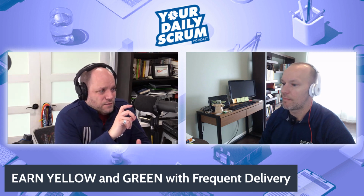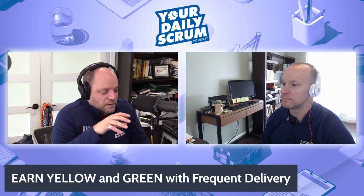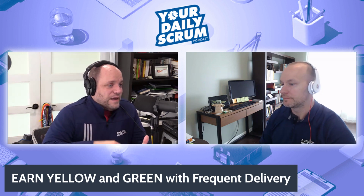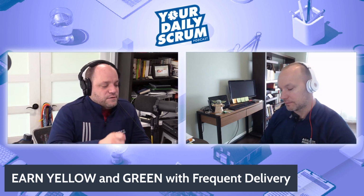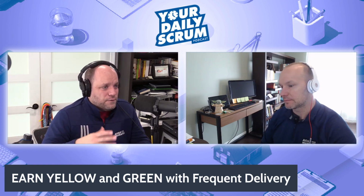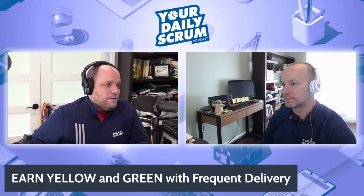Now think about what that means. We're not waiting till the end to tell everybody there's a problem. What we're doing is encouraging teams to find ways to deliver work as soon as responsibly possible to earn their way to a green status so that they fall off of the bad report, right? They fall off of the trouble projects, but it also teaches them we're after frequent feedback, rapid delivery, frequent feedback, new decisions, better decisions over and over and over again. This slight change starts you down that path.